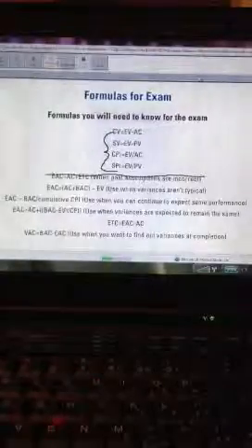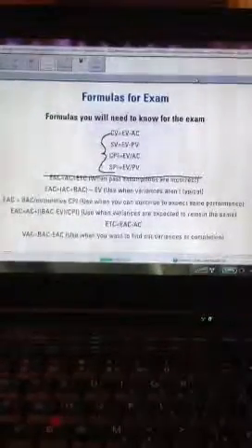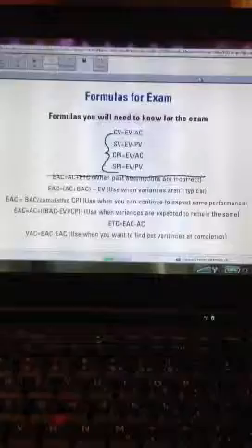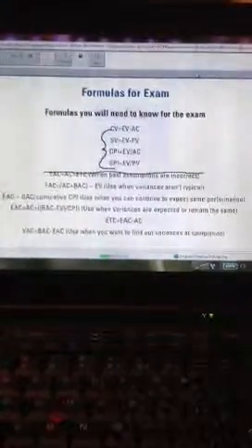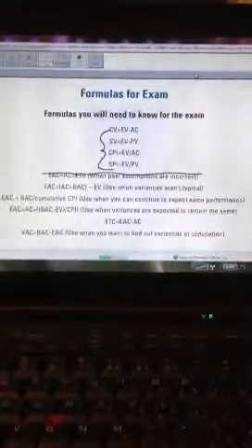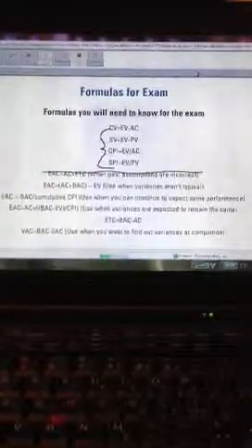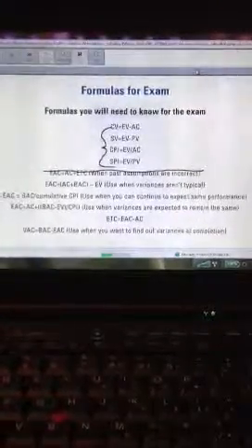Our estimate at completion is our forecasted estimate for the total amount that this project is going to cost us based on past and current performance. It's a forecast. We're forecasting future based on what's currently going on and past performance.